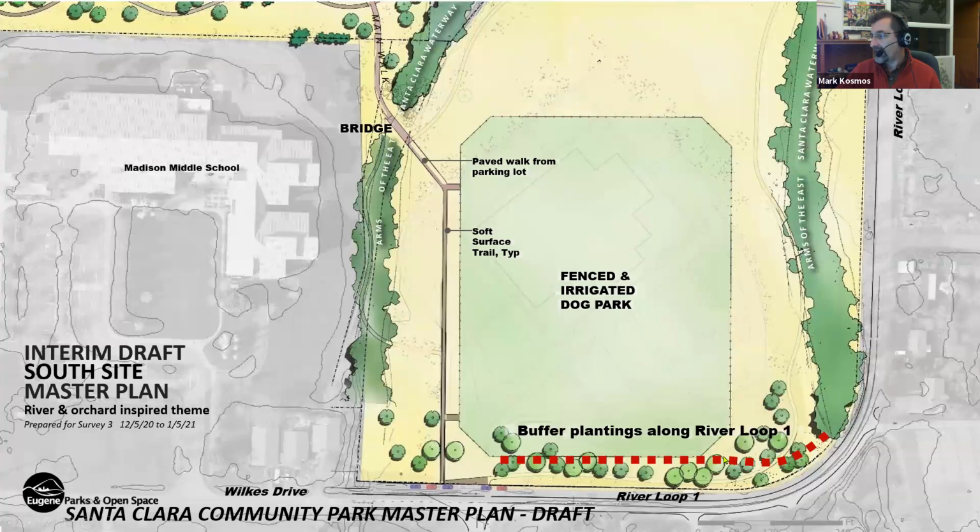On this edge, and how that extends and ties into the future dog fence here, we're in the process of working out. But that access control is going to happen before we start doing some of the formal construction for the park, because that's about protecting our park and resource and curbing some of that illicit behavior. Right now, this whole corner is pretty much at grade with the street, so this is kind of where people come in and start driving around. As you get a little bit further to the west, you pull a vehicle off of that and it's kind of sitting like this. So it's probably needed a little bit less down here, but that's the kind of thing that we have to design and figure out. So yeah, we'll put something in there.